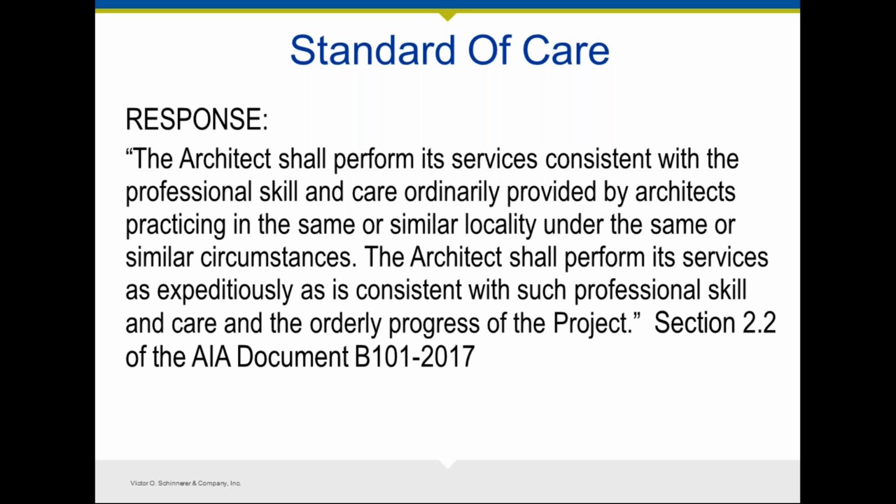However, you always want to make sure that these obligations are tied to your standard of care and that you will perform these services as expeditiously as is consistent with such professional skill and care and the orderly progress of the project. A statement like that oftentimes helps clarify what is expected of you. And as long as you tie it back to that standard of care, then you're in good shape, at least as your contractual obligations are concerned.